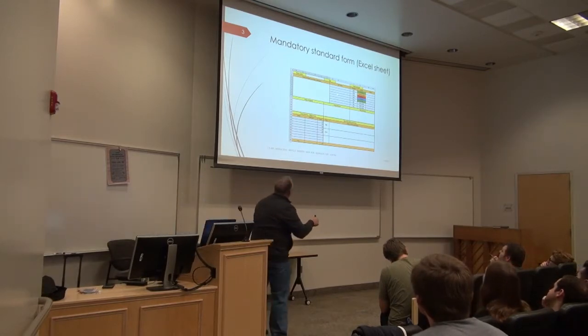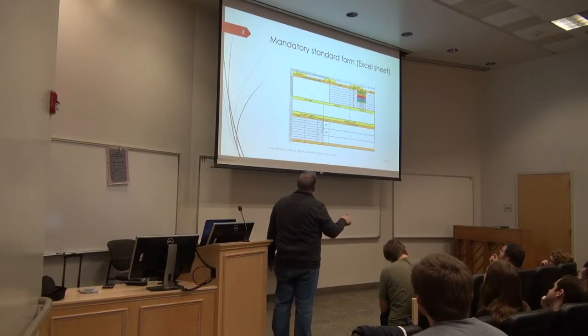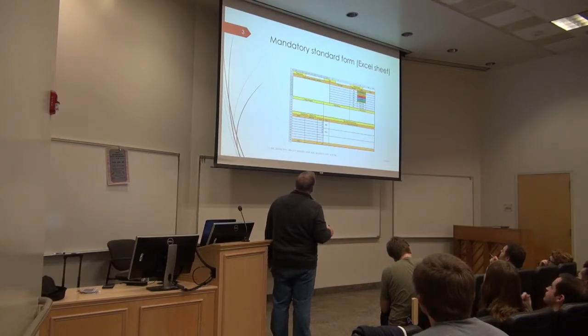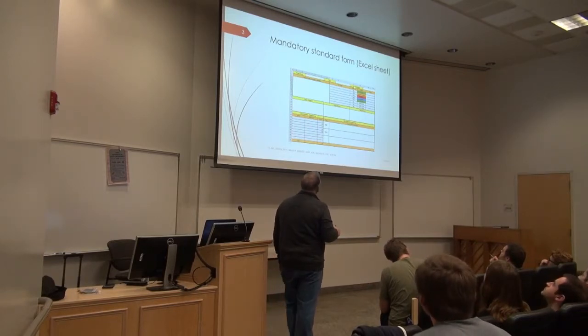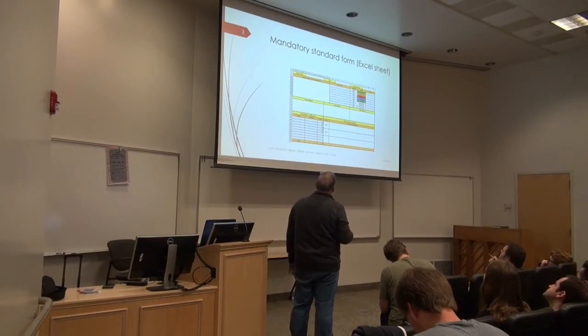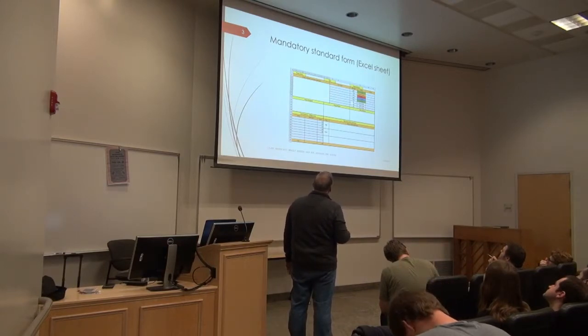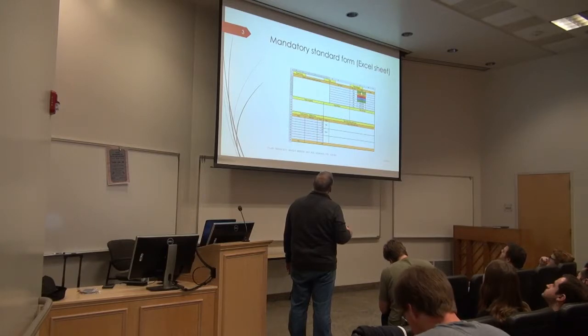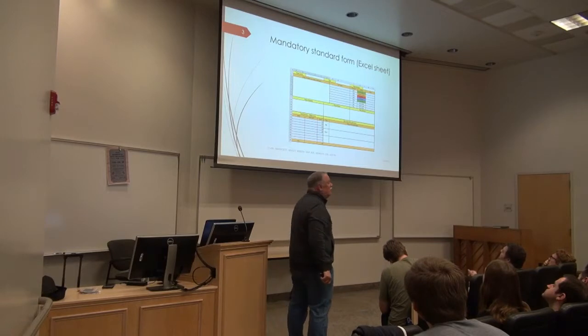I have teams that have greatly expanded the list of tasks and have kept track of them. You know, I want to see, this is your estimate. Now, we've mocked the percent complete, so you want to be real certain on what you can do here, but sort of here's the task, here's how far done it is, this is its current status, here's when we think we're going to finish. We should update those each week.